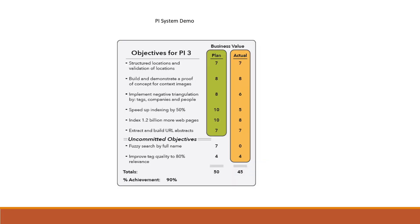The PI System demo will have looked at the goals that the PI set and the business value, and then we decided at the end what actual value we achieved. Our target on this particular slide would have been 50 points, but we actually got 45 story points of value, achieving 90% of what we set out to do, which is pretty good.